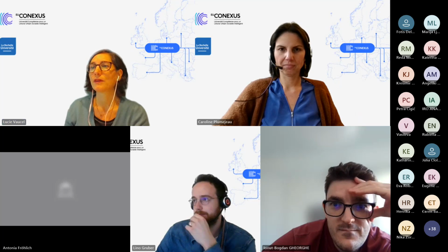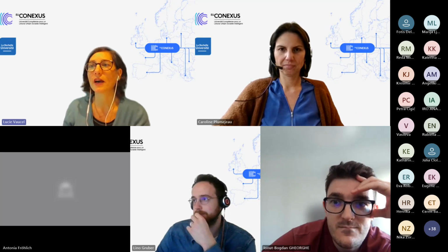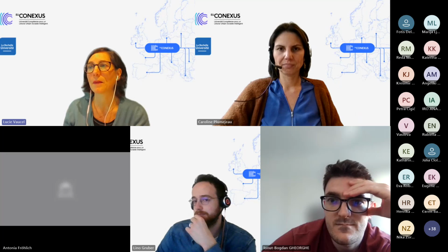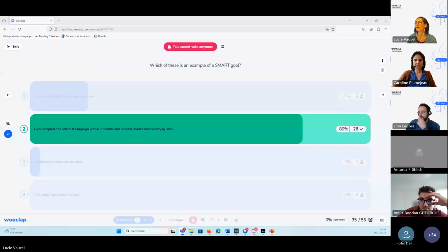35. Okay. The correct answer is: I will complete the scientific campaign within 3 months and increase marine biodiversity by 10%. It's really concrete, with precise figures and a precise duration. Yes, and in this objective, you have all the ideas of the SMART methodology. This objective is specific, measurable, achievable, realistic, and timed. So it's the right answer.